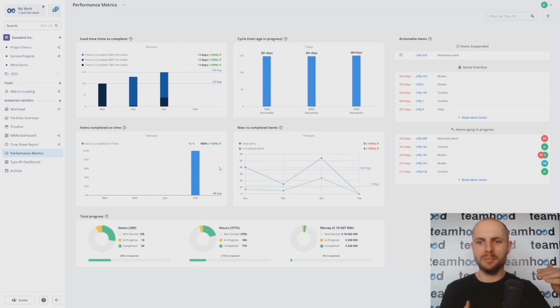Because it just means our team's backlog is overflowing each month and we're not doing anything to minimize it. And eventually, each month increases a cost of prioritization, because I really hope that you still look even on old items and decide whether they still make sense or they should be deleted, right? So the more you have, the more expensive it becomes. Simple as that.